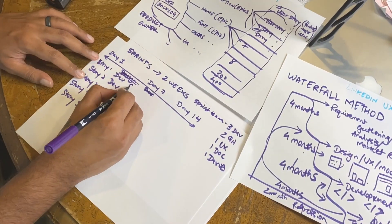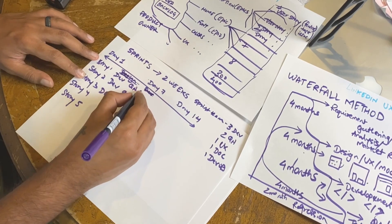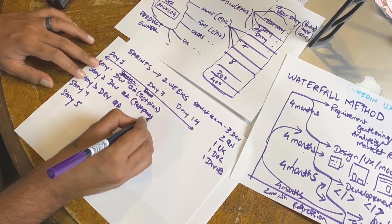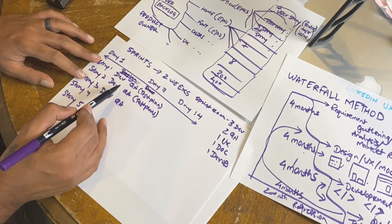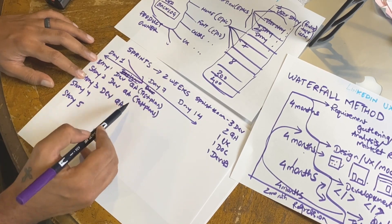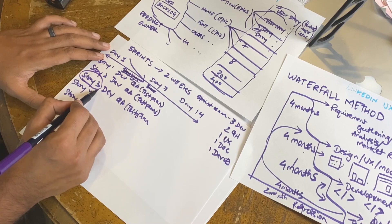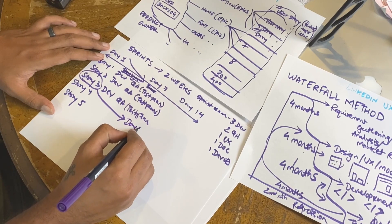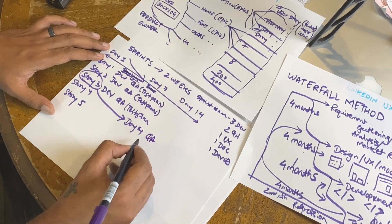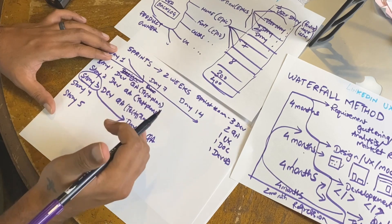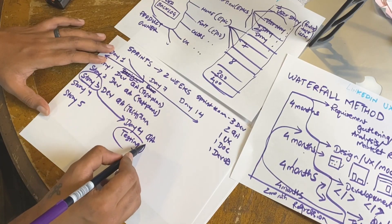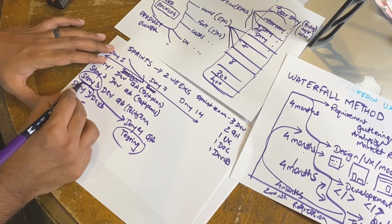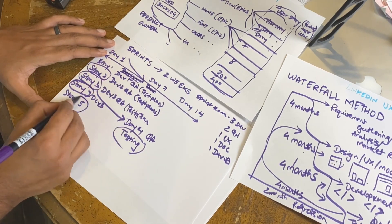So they are not waiting for day 14 when developers are completing. On day one itself, they are completing all test plans which developers are working on. Let's say story three gets done on day four. They are not actually starting to figure out what do we have to test - they are already ready with the test plans. QA is fully ready. When QA is performing testing on day four, dev three picks up story four. Dev two finishes his story two then he picks up story five. On whatever day, this thing keeps going.